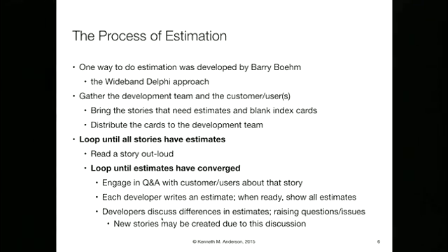But at the very beginning of this process, and this is where you'll have to allocate some time for boot up and training, you might flip it around and one person says 1 point and another person says 10 points. At that point, what you have to do is discuss your differences. Why do you think this is a 10-point task? I think I can get this done in 1 day. What am I not thinking about? Oh, well, yeah, you've had experience with databases, but this is going to require scaling up, and that's really hard to do. I'm worried that it's not going to be as simple as you think, that kind of thing.